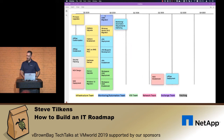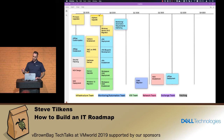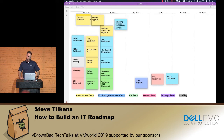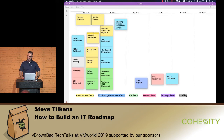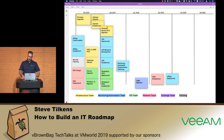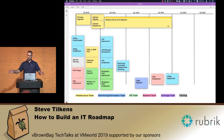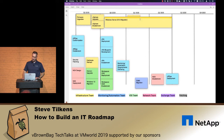This is a very aggressive roadmap by the way — a lot of stuff going on. Don't think three people are going to get all this done. But it's typical — I see it a lot as a TAM because customers buy these products and we need to put together a plan for how to implement it all. So we've got the vSphere upgrade, and we need to do firmware upgrades before that, so firmware comes first. We'll include vSphere enablement around the same timeline, and then once that's done we'll start focusing on upgrading guest operating systems. We'll also do a VMC on AWS POC around that time — that'll take about three months.